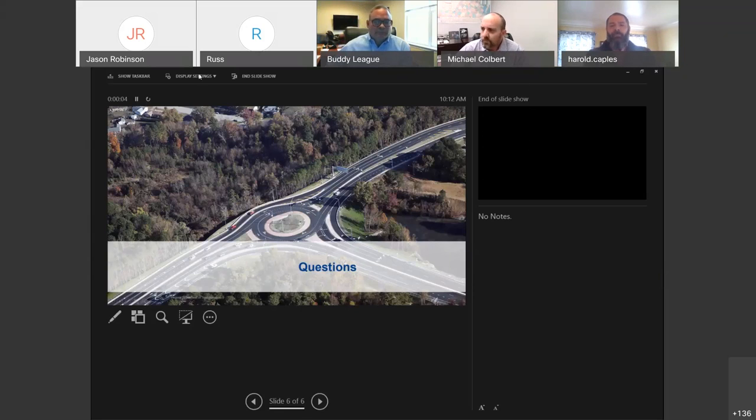But we're going to jump into this. And one of the things that we talked about yesterday from the FHWA and VDOT perspective with the locals was quality review on contract documents and contract development. And what we were really talking about there is the specifics, common errors in an IFB: not including completion dates, specification references on the bid not being clear, whether measurement and payment is not clear or not concise.